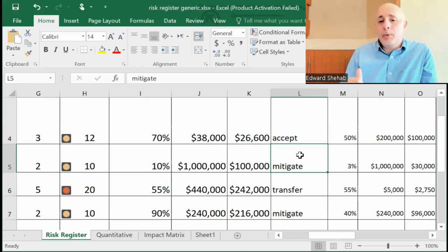We'll do all the things that we can as precaution. By reducing the chance of fire, we can even stipulate that nobody can have live cooking in the building, and that would reduce the chance of fire. But it doesn't mean fire cannot happen. It can still happen, right? Somebody could be smoking something and then start a fire. So when you mitigate, there's still that residual risk.